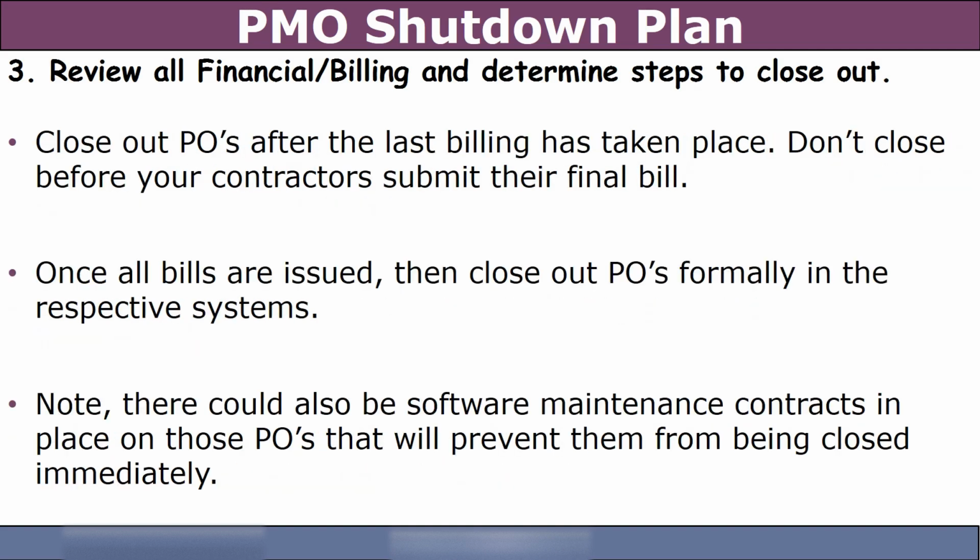Right, so close out the POs after the last billing has taken place. I can't stress that enough. I've seen that happen before. I've seen POs shut down and there were still open billings, and it becomes a financial mess.